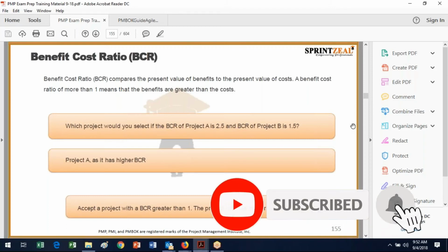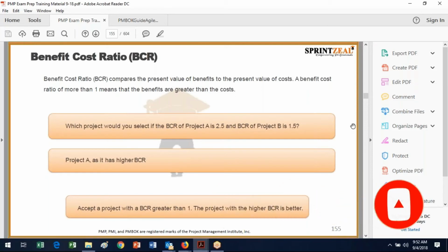And of course, here you're including all of the factors that contribute to benefits and all of the factors that contribute to costs. So whether that be goodwill as a benefit, or spoiling the environment as a cost, that's all factored in. Everything is factored in in the benefit-cost ratio. So if it's less than 1, that means you've got more costs than benefits, and you shouldn't do it in any case. And if it's 1, it's kind of a toss-up.